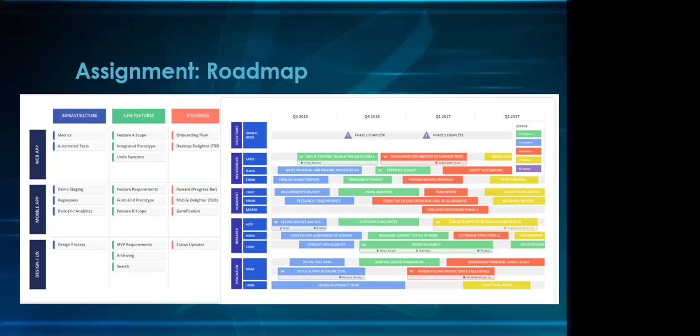Yeah, what you're saying is we'll break it down to the epics. I would even, for your roadmap, keep it at maybe the feature level. So you've got homepage. As a stakeholder, I want to know when my homepage is completed. Your homepage is going to be complete because I'm thinking about your MVP, your minimum viable product. So what that means is, at the end of sprint 3, can I release a product?